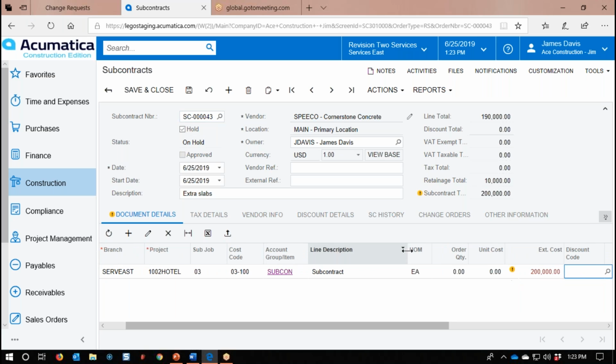You're going to notice I start getting these error messages. What it's telling me is, hey, you only had this budget. You've already consumed this much. You only have this much available. You're way over. It will also do that even though I was already over on this particular line item because of a demo I did earlier. It will tell you, hey, you only had $160,000 to go. You're about to go $40,000 over. So that's what the warning is doing right now. It's giving you a lot more detail behind the scenes as we're entering things, so we know what's happening before we issue anything. Great feature, and it's going to get better and better.